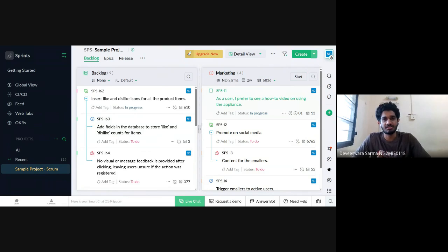So what is next? Our one sprint is done, and we have built some features. Next comes the sprint review, which is a meeting with the stakeholders, product owners, and clients. Everyone is involved in that. The purpose is to demonstrate the actual, working software that the team built during the sprint. Let's say I developed some features, so I have something to say. What were the issues, what were the outcomes? Everything I can discuss.